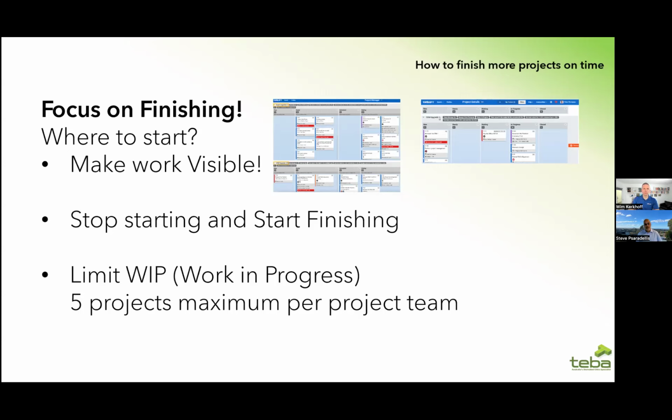You literally have to pick the 3 that you can afford to have delayed, but guess what? Here's the truth. By delaying those 3, every project, including those 3, will finish quicker. That's the scary bit, right? So I suggest give that a go. Focus on finishing, but limit the number of projects you have running in parallel.